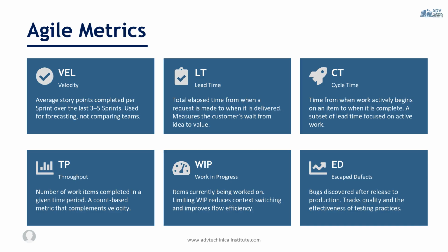It's important to remember that velocity should not be used to compare teams because teams estimate differently. So, for example, Jack's team cannot compare themselves with John's team. Each one works separately, differently. Next is your lead time.